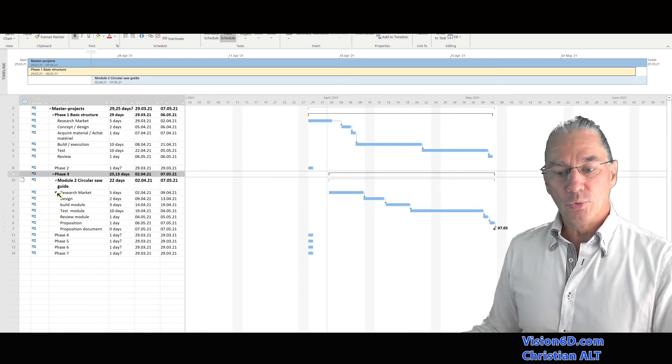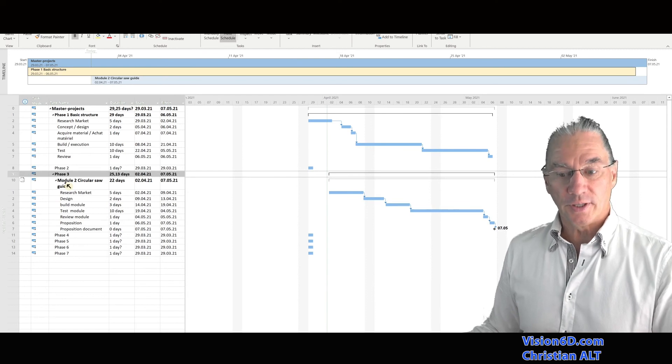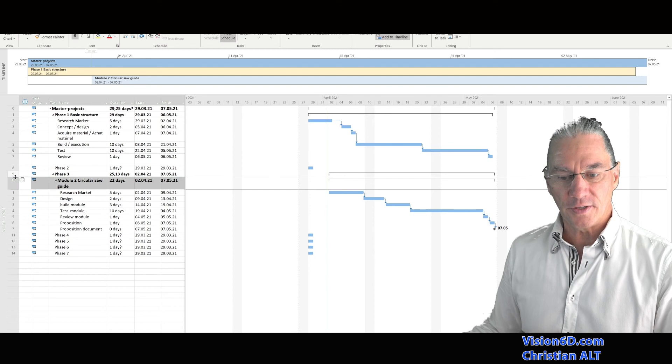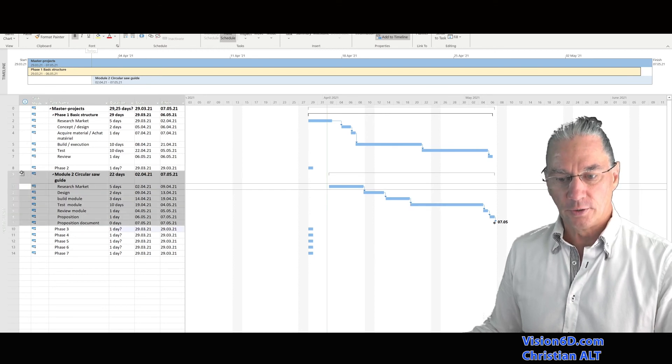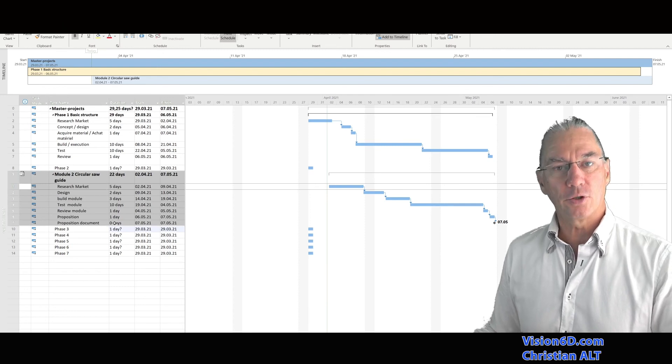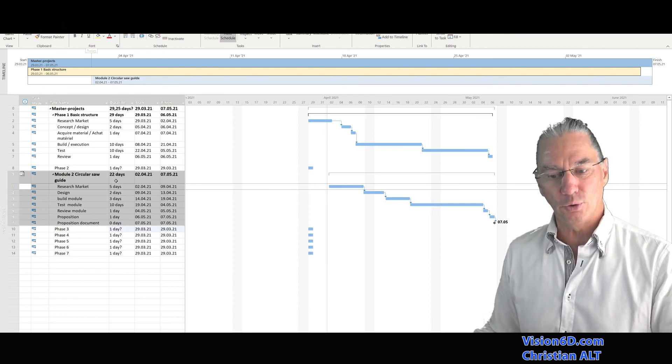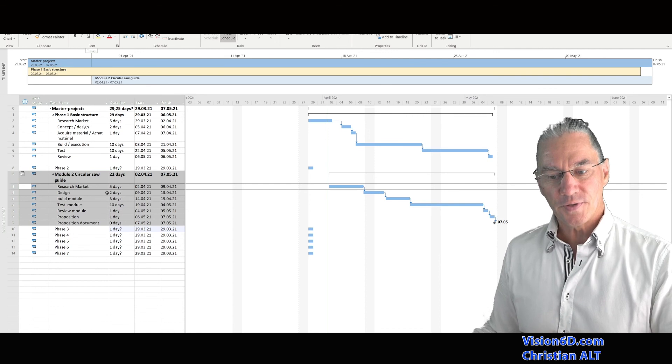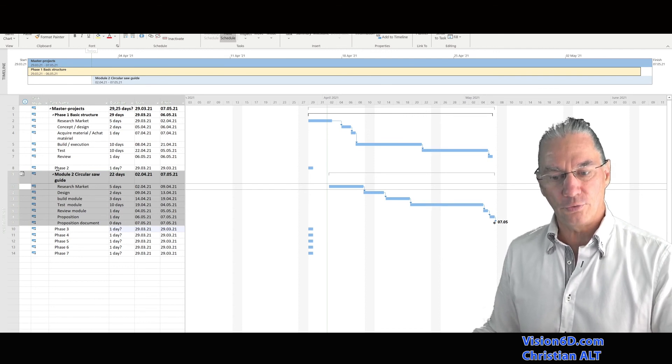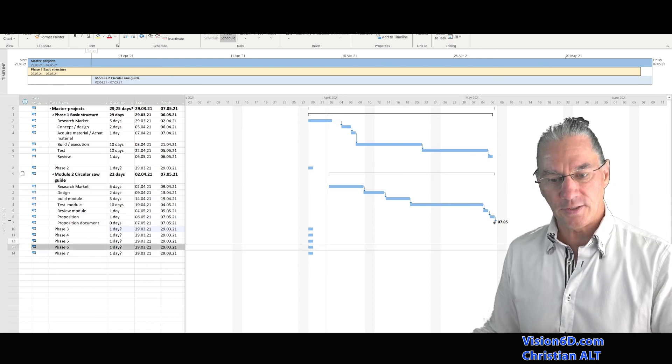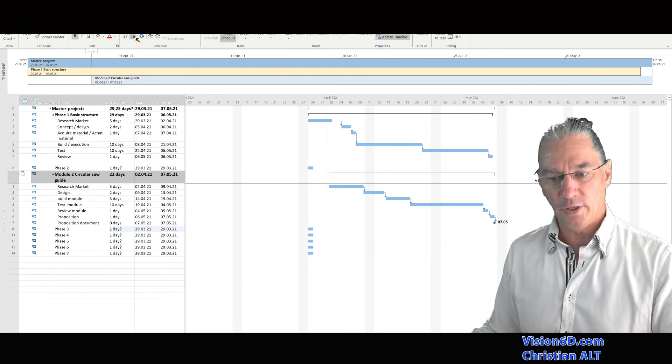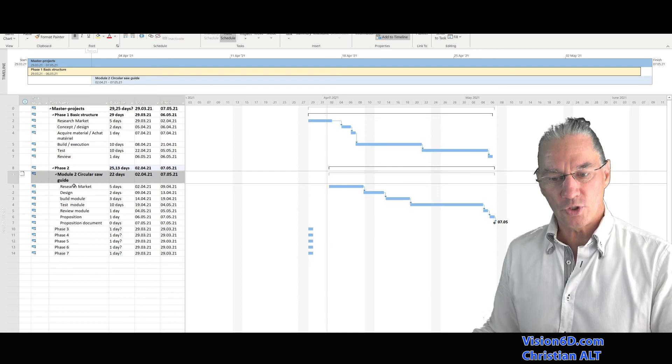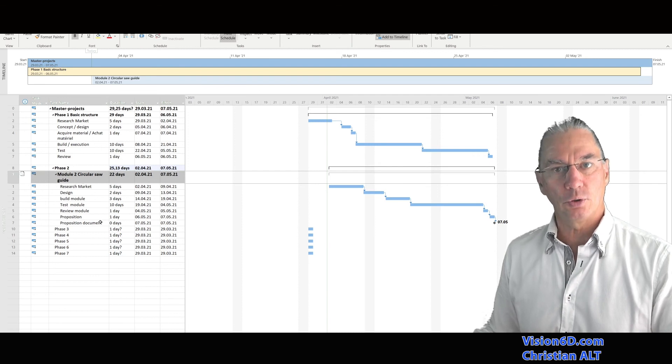Since we removed module one from phase two, it is clear now that module two is becoming the content of phase two. So for that, I'm going simply to slide it up here. And we see that the complete content of the file of module two circular saw guide is now below phase two. And what is left to me is to indent it also once here, as we did before. And now we have a phase two which is composed of module two.